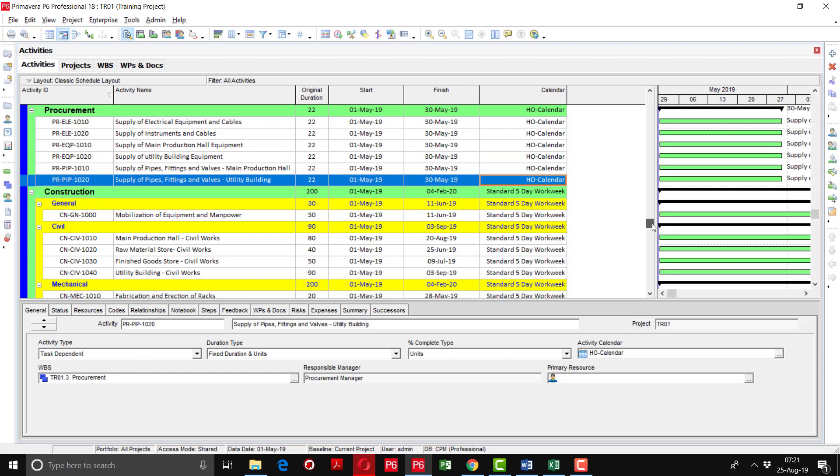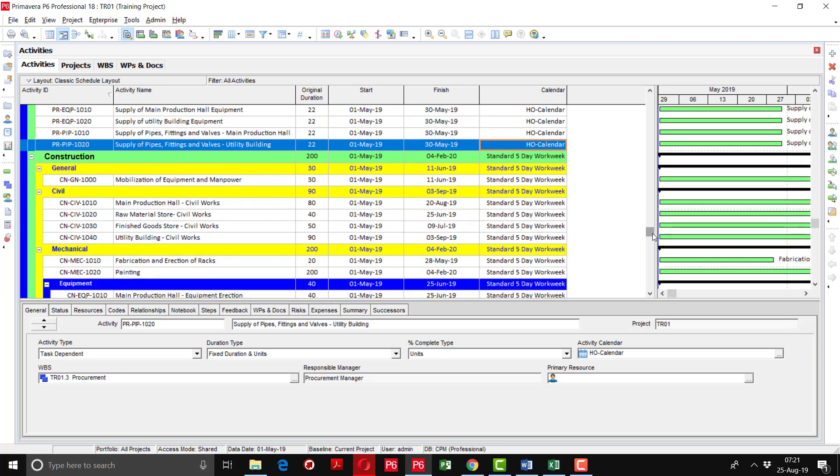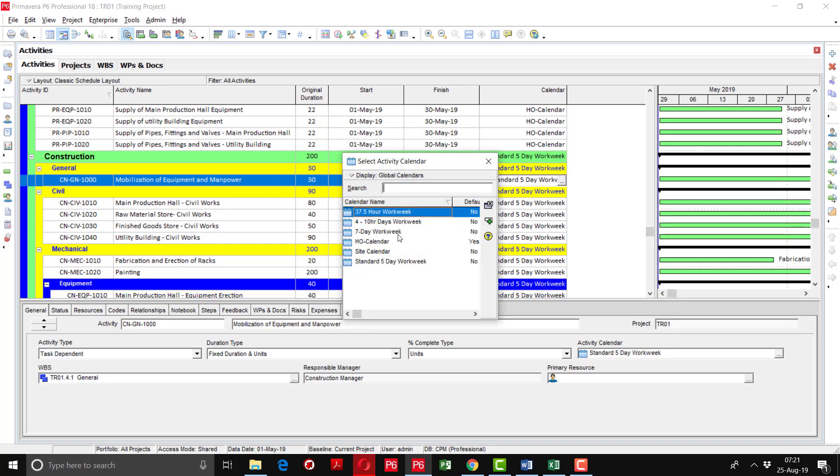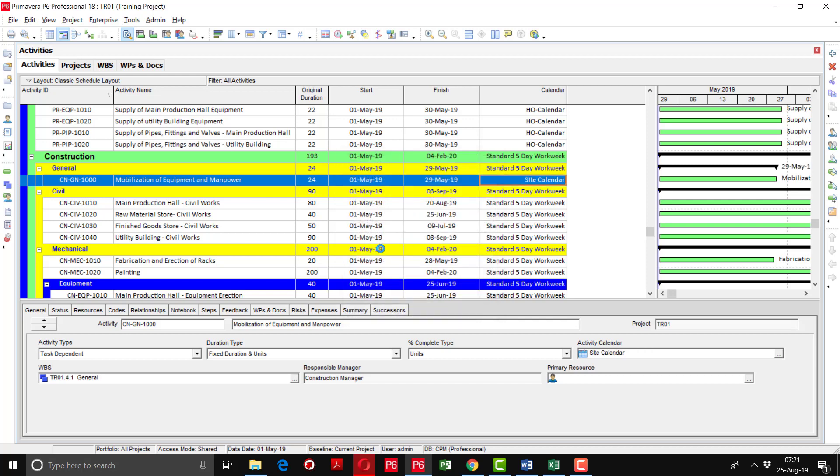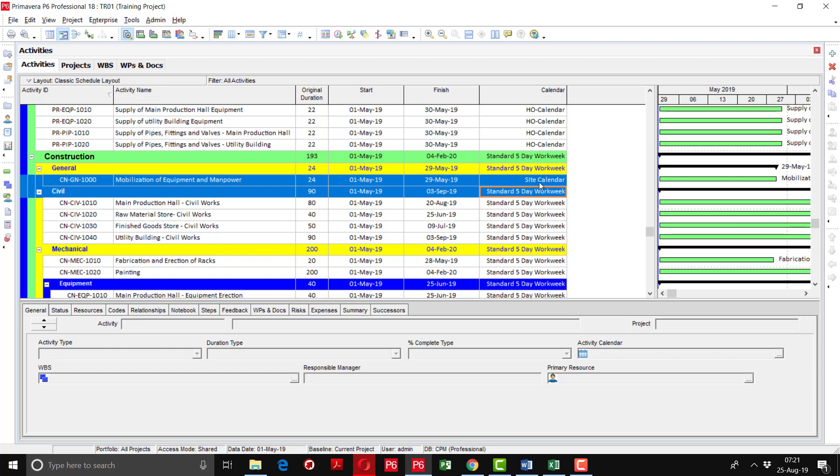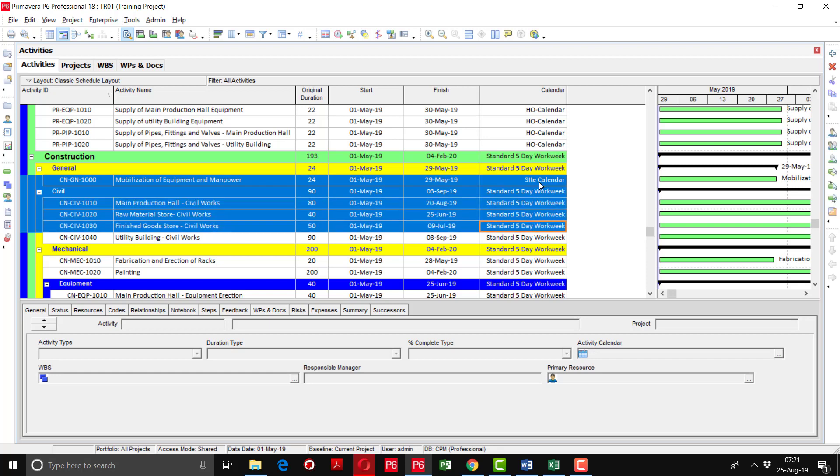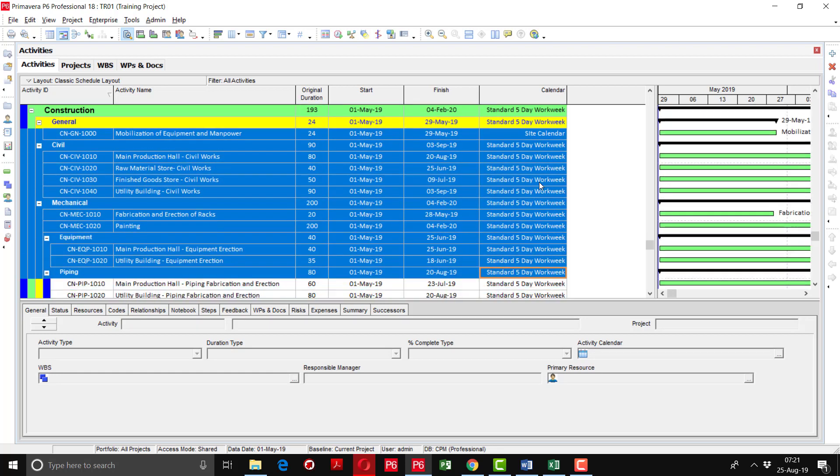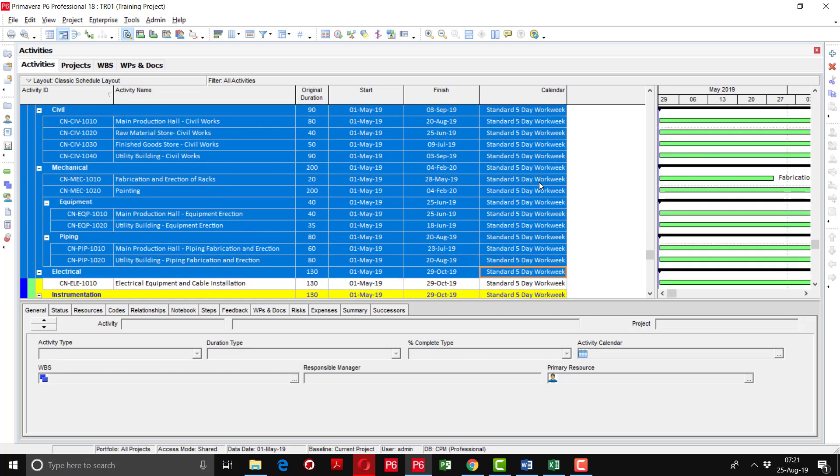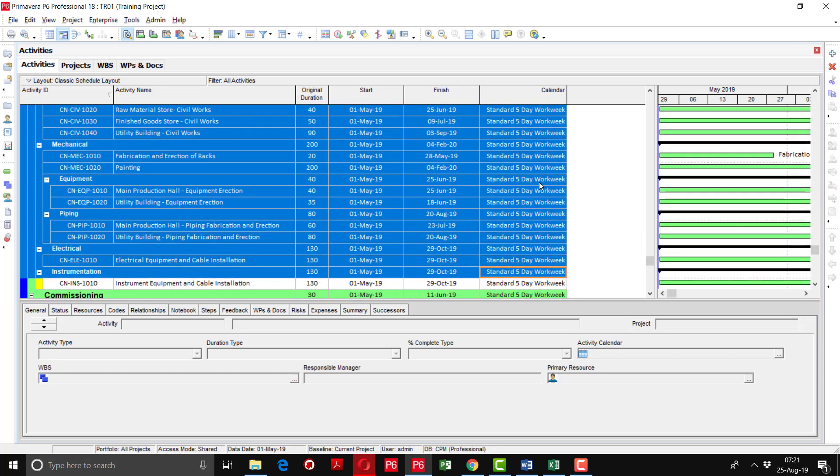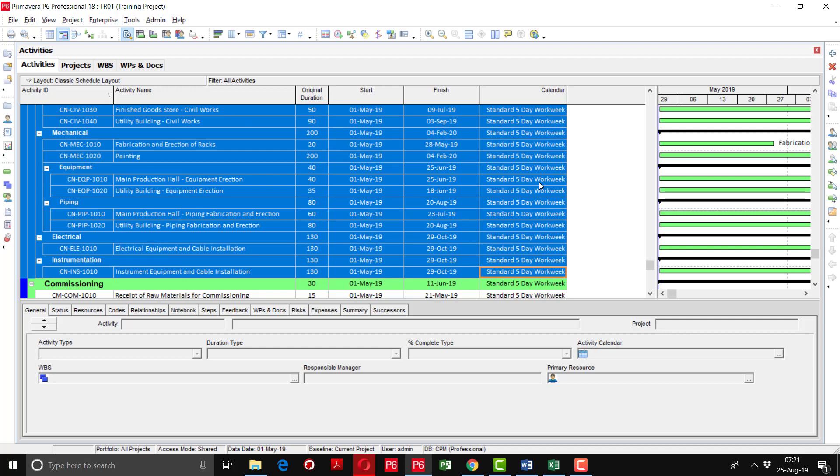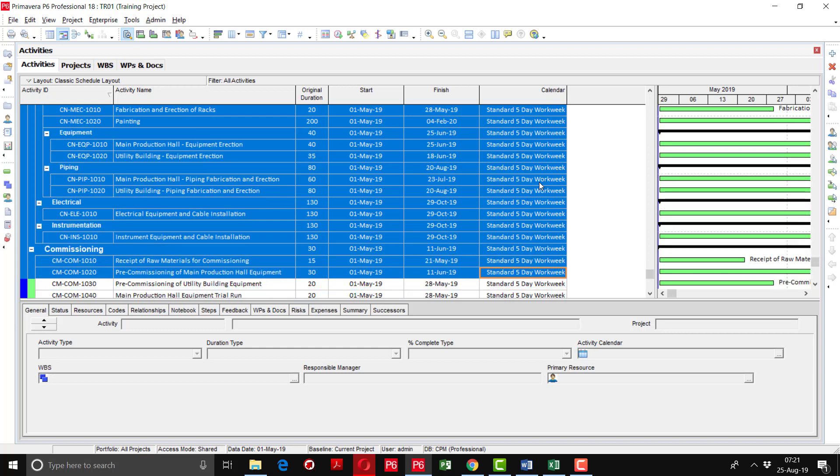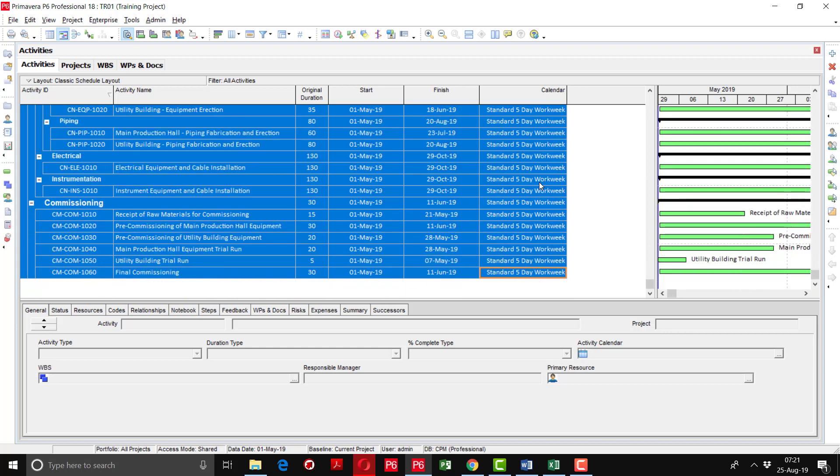Now go to the construction WBS. The construction is going to be conducted on the site so we are going to assign the site calendar. In the same way, I have to change the first activity, then by pressing the shift key I am going down till that activity on which I want to apply the required calendar.